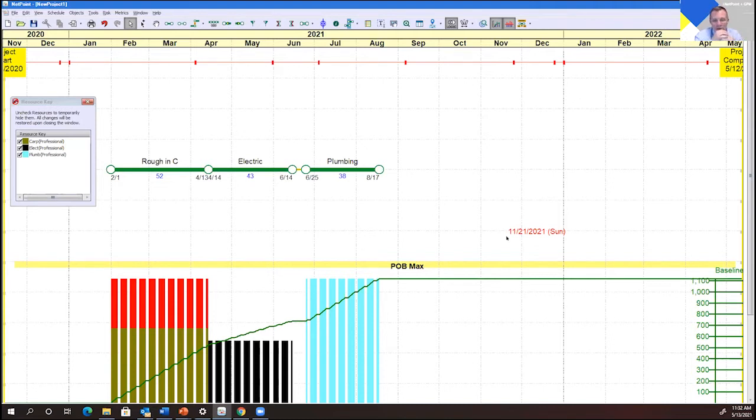We have another application in the manufacturing field, and they are using NetPoint to plan manufacturing and delivery, but one of their constraining factors was inspection. They needed a certain number of people to be able to do inspection, and if they had too many programs producing simultaneously, then they would overwhelm their inspection capabilities. So they use the resource constraint to talk about how they can plan their production so that they keep their inspection people busy but not overwhelmed. So that's the quick insight into both Layout Manager and resources.